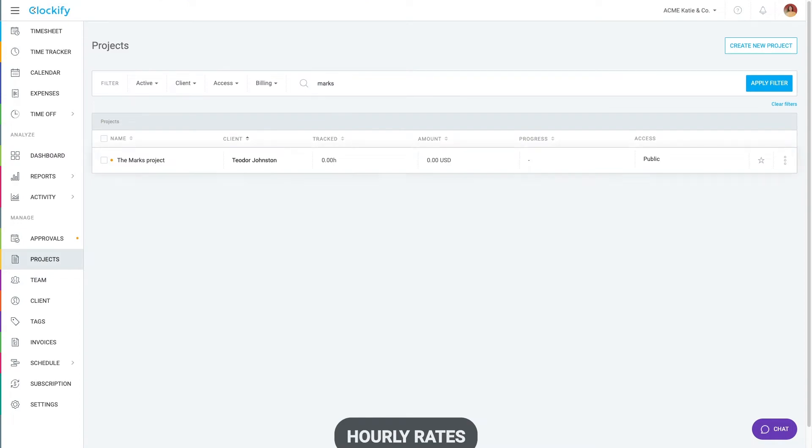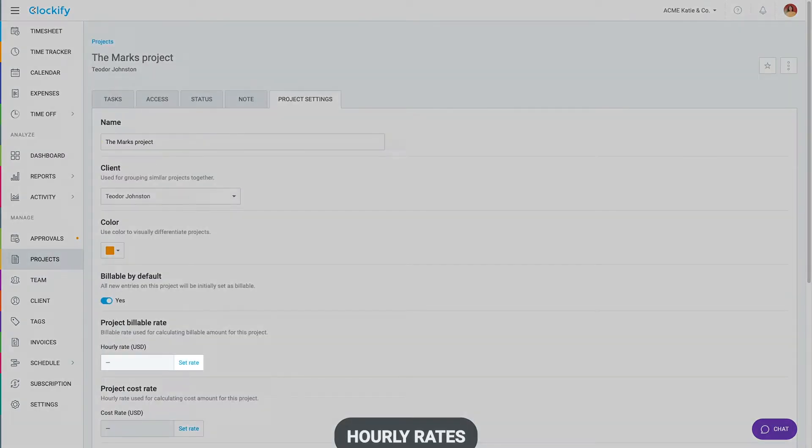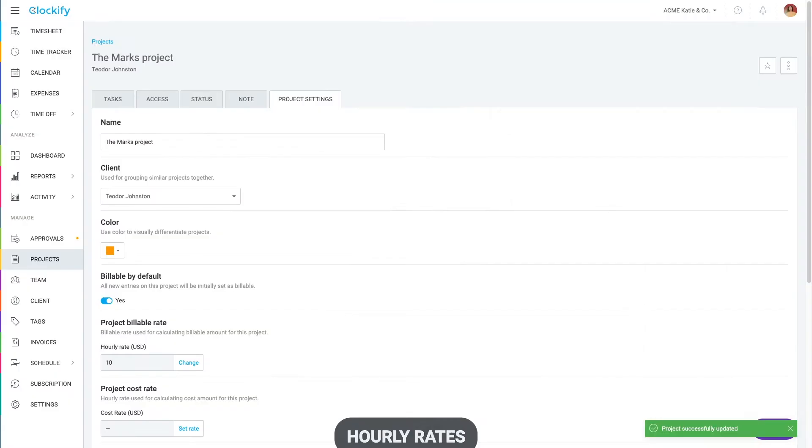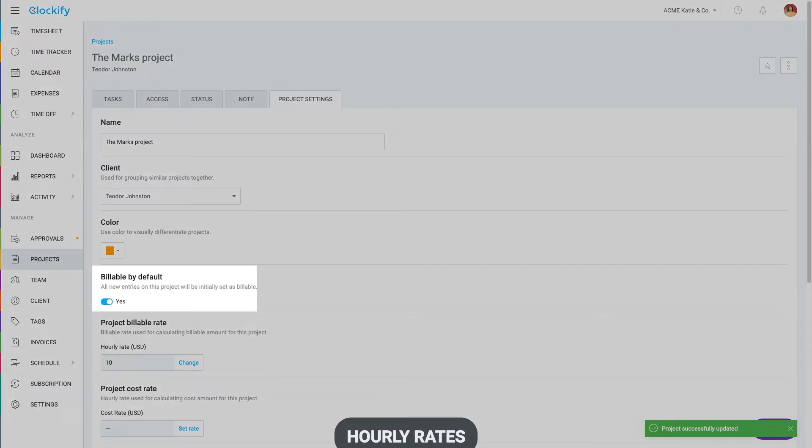In the project settings, you can define the project hourly rate and define where the track time on it is billable by default.